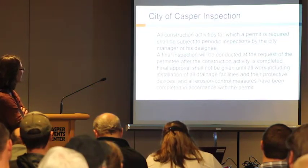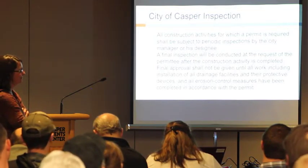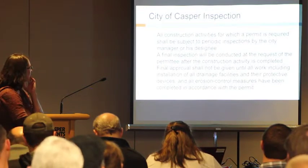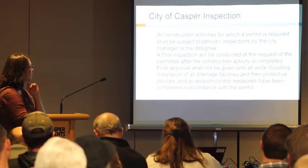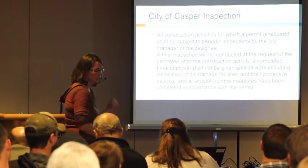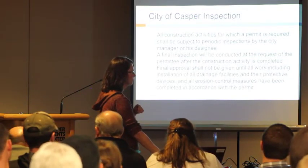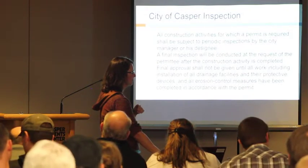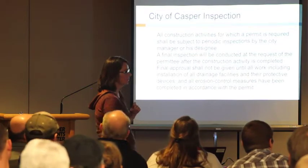Final inspections will be conducted at the request of the permittee after the construction activity is completed. Again, you've got to inform us that you're completed. Final approval should not be given until all work, including installation of all drainage facilities and their protective devices, and all erosion control measures are in place, and all seeding is done. Just because you have your BMPs up doesn't mean you're done. You have to have it seeded. Just because you have it seeded doesn't mean it's complete, if there's reason to have erosion measures and BMPs in place until that seeding is done. So you have to have all those in place before we can consider it a final inspection.